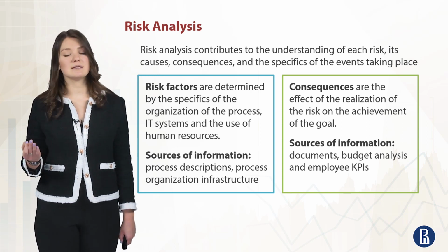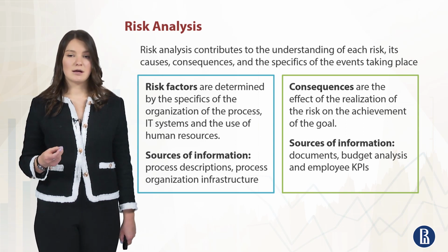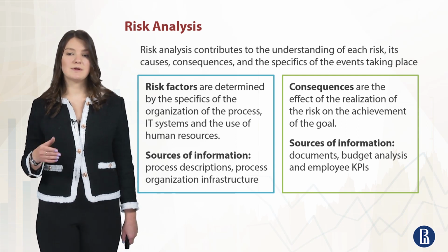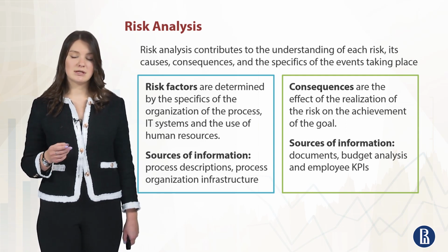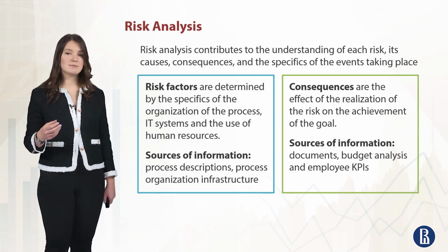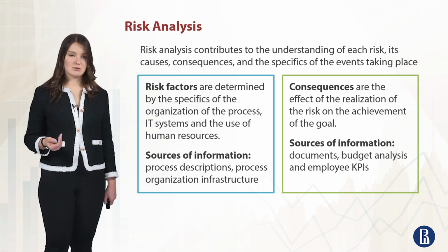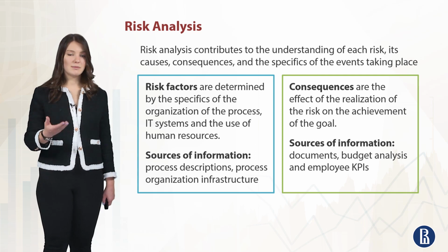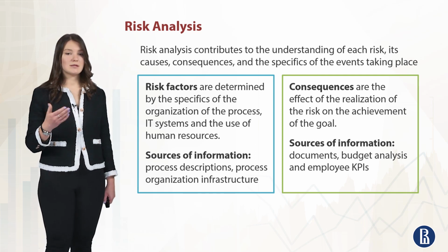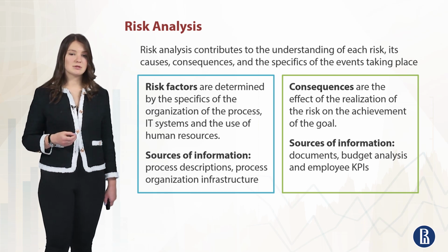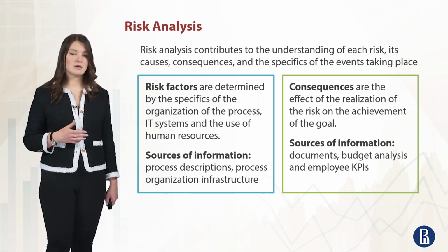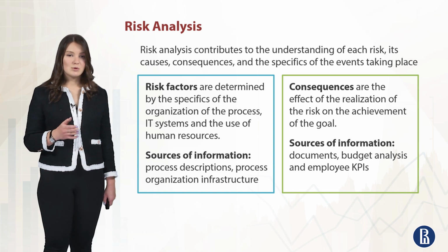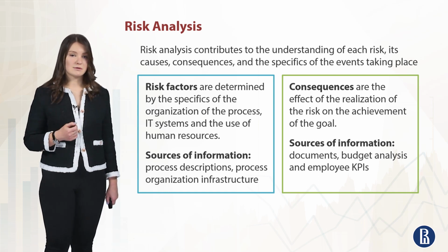In most cases, the consequences are some financial consequences, financial losses, and non-achievement of KPIs and budgets. There are also some problems, but they are not the risk, they are the consequences of the risks. And the risk factors are the sources that can make our risk occur. Examples are our process descriptions, our internal infrastructure, and some macroeconomic activities that you cannot manage. So they will be our risk factors.